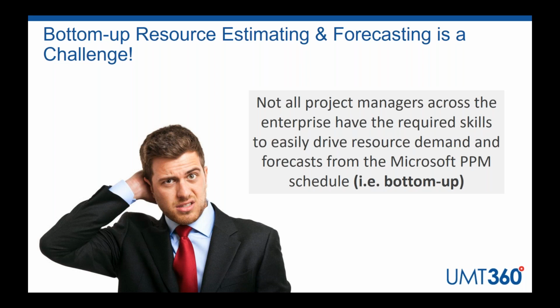We have accidental part-time project managers. The new, obviously, push for agile project management and various things. So the reality is that what can happen when you're not well-versed in the Microsoft PPM schedule and don't understand all the idiosyncrasies of how things can change, you can get a little bit frustrated. That often leads to creation of shadow resource plans in Excel or equivalent, which are maintained outside of the system. And that's where the wheels start to wobble a little bit and maybe fall off the bus.